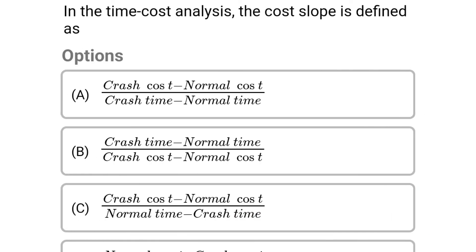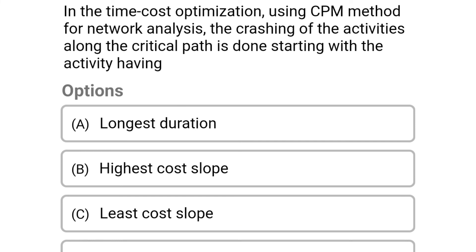Next question: in time-cost analysis, the cost slope is defined as — option A: (crash cost minus normal cost) divided by (crash time minus normal time), option B: (crash time minus normal time) divided by (crash cost minus normal cost), option C: (crash cost minus normal cost) divided by (normal time minus crash time), option D: (normal cost minus crash cost) divided by (normal time minus crash time). The correct answer is option C: (crash cost minus normal cost) divided by (normal time minus crash time).